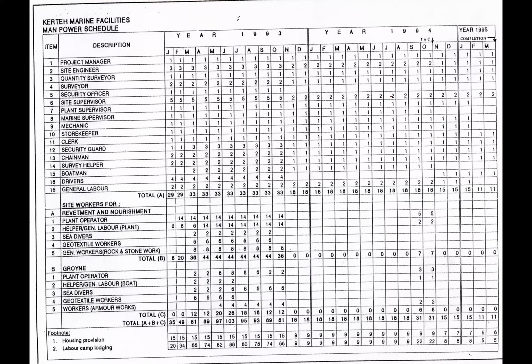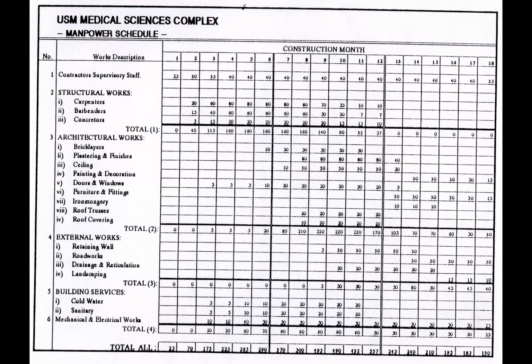You see, in Microsoft Project, once you input the data in your resource sheet, you can see all this tabulation in what we call resource usage. There is resource usage and task usage. You can click on resource usage, then you will get all this kind of tabulation, similar to what we are doing. Okay, but this one we did on Excel or simply manual calculation.